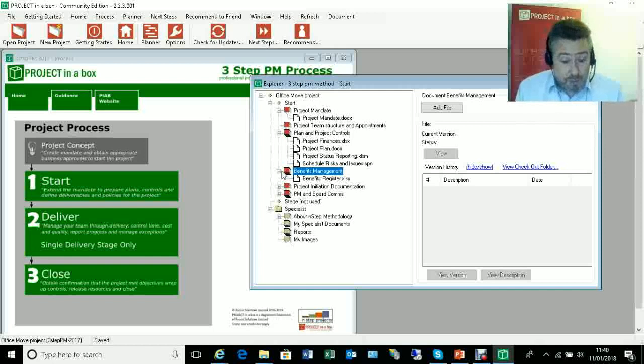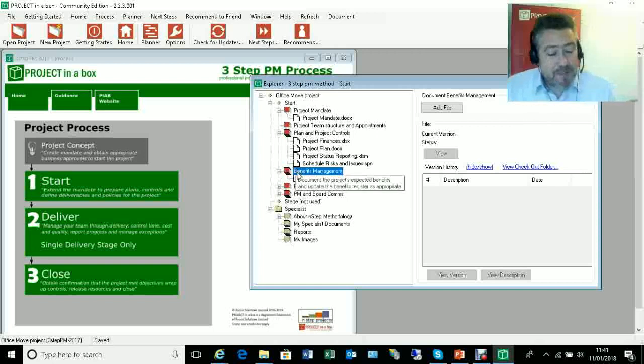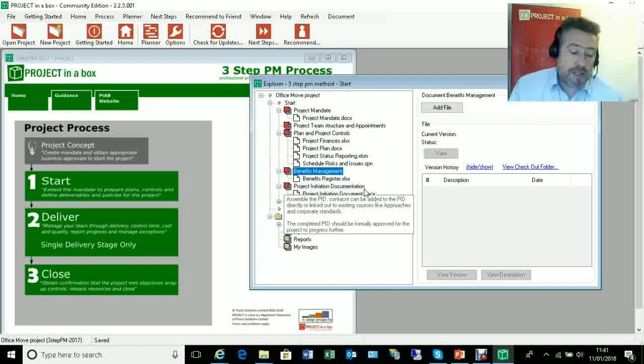And if as we start to work through the project we understand that the benefits are not really quite what we thought they were going to be, but the costs are going up, well, at some point it's not worth doing the project anymore. And so getting a really good handle on those benefits is good for those particular sorts of projects. It's a good exercise to do anyway, but in a small low complexity project you may consider not doing it. And we're working our way through this towards the end objective, which is producing our PID.